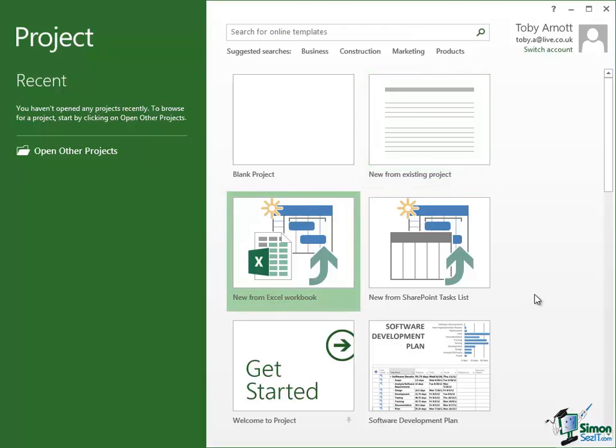Now that's the basic idea behind templates that I'm going to talk about in a moment as well. Below that is another option, New from Excel Workbook. And this enables you to import task type information, for example, that you have in an Excel workbook and use that as the basis for a Microsoft Project project. Now that's somewhat outside the scope of this course but I'm going to give you a straightforward example of that later on.